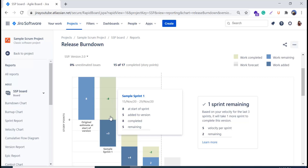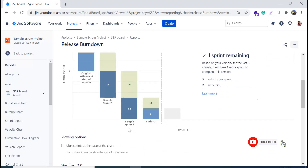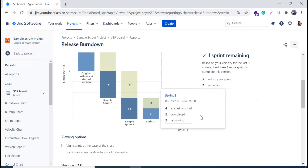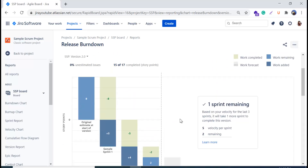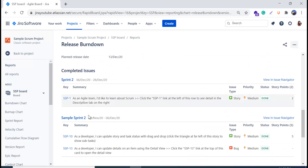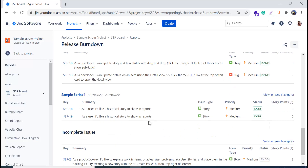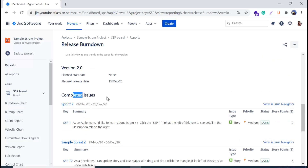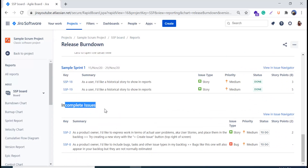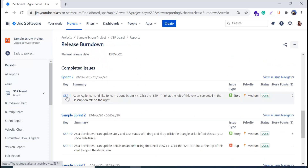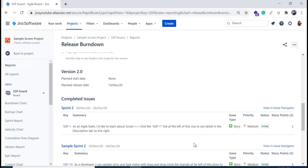In the second sprint, four story points were added and five were completed. In sprint three, two story points were completed and two remain. You can click on any bar to check the information in the pop-up. When you scroll down, you can see information about each sprint — sample sprint 2, sprint 2, and sprint 1 — along with completed and incomplete issues. You can click on a specific issue to open it and see details like issue type, priority, status, and story points.